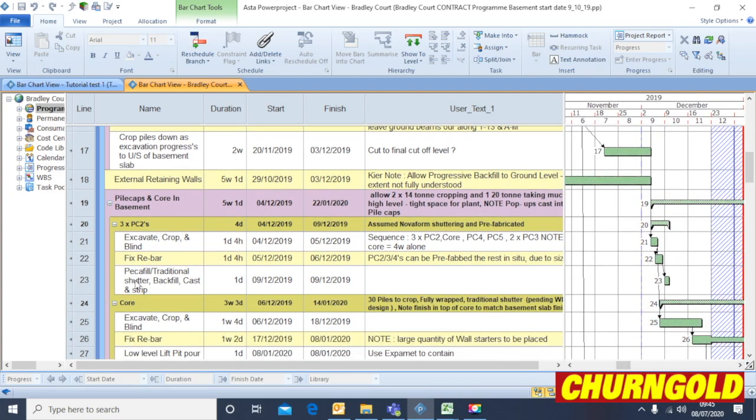This is one similar to the example, the work example I've just undertaken. These are for the pile caps: excavate, crop, blind, fix, rebar, pecafill and cast.